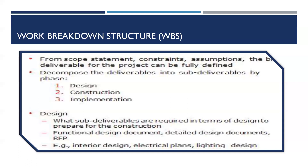When you decompose into sub-deliverables — in terms of design, construction, and implementation — for design, what sub-deliverables are required to prepare for construction? You have to consider the functional design document, detail design document, or RFP. Examples include interior design, electrical plans, and lighting design. For interior design, you specify things like the color of the master bedroom or the children's bedroom.